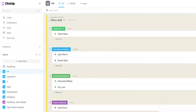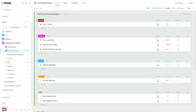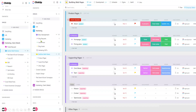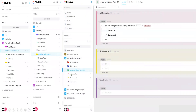An example of a typical setup often used for marketing agencies includes spaces created for internal departments such as HR, operations, IT, sales, and business development. Folders can be created for requests like ticket requests, paid promotions, and SEO. Lists are created for service types such as blog requests or product pages. Tasks represent each project with subtasks for each project deliverable.